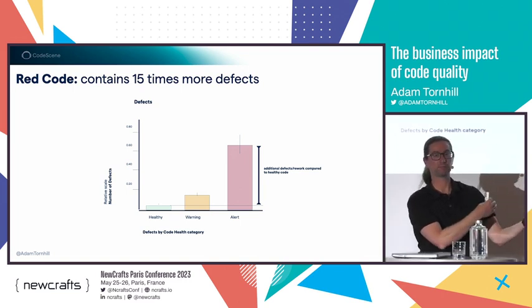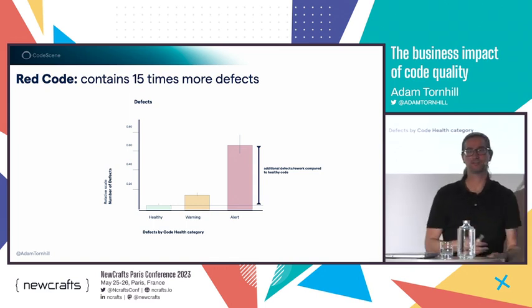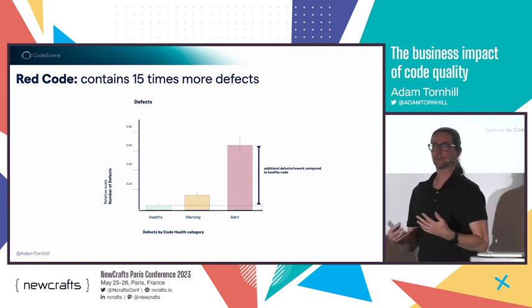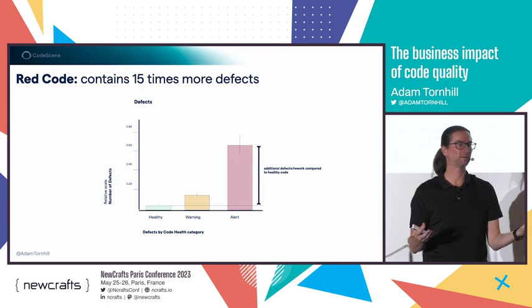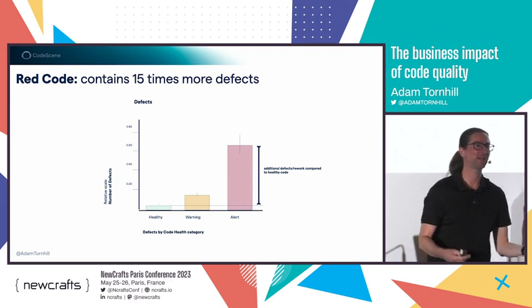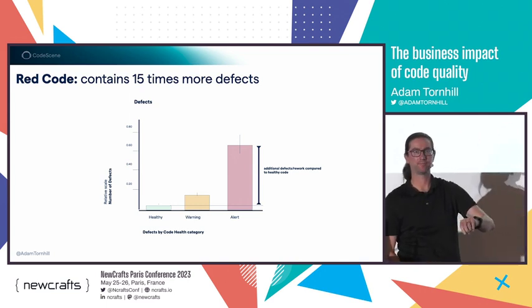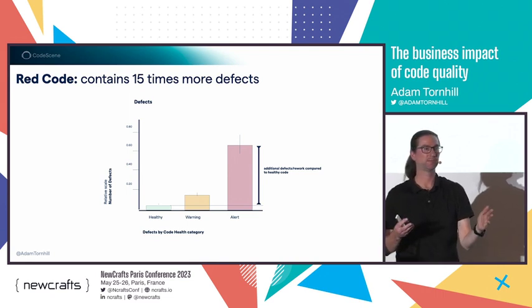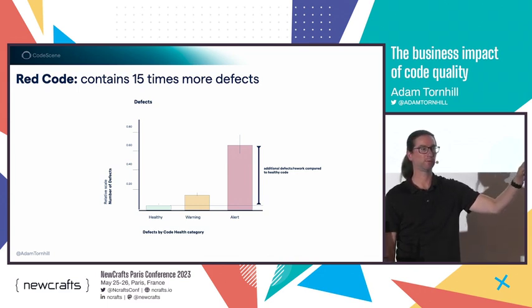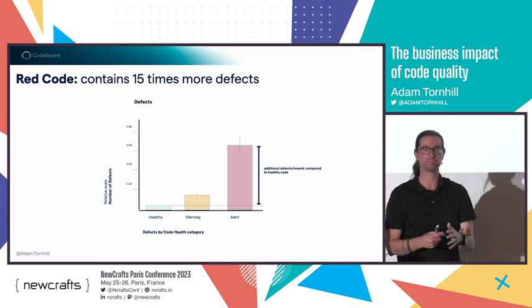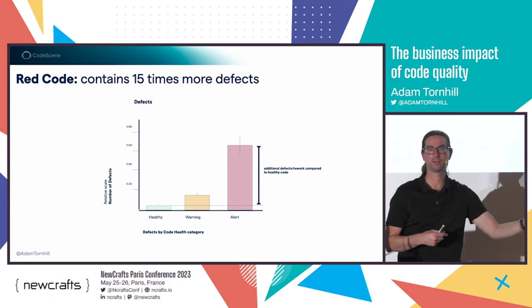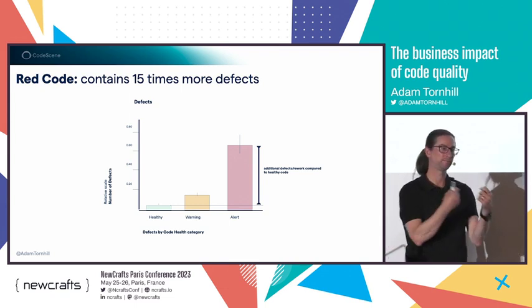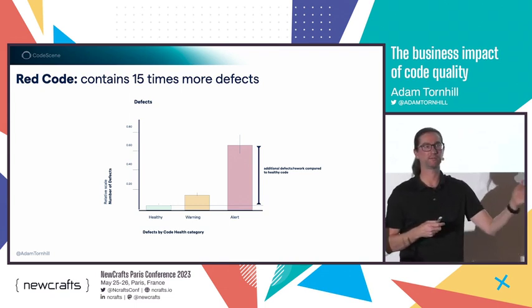That's a problem in itself, but what makes it worse is that defects have this property that, just like in the old Stephen King movies, they come back. And they come back in the shape of unplanned work. And unplanned work, in the words of Gene Kim, is the silent killer of IT projects. I've seen companies that spend 60 to 70% of their work week on unplanned work. It's a real productivity killer, constant context switches, impossible to predict when anything would be delivered, right? It's very demoralizing to work on unplanned work rather than doing the next cool innovation.